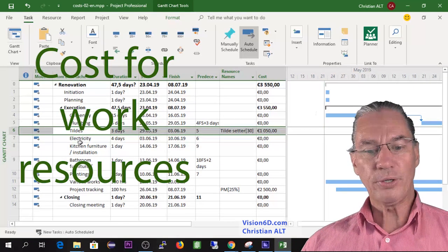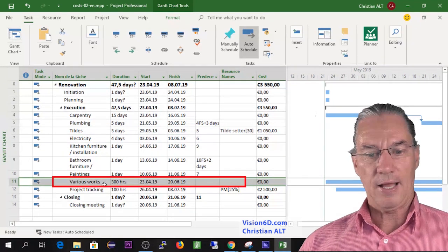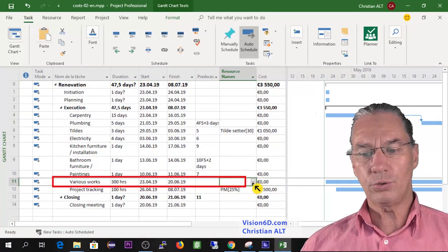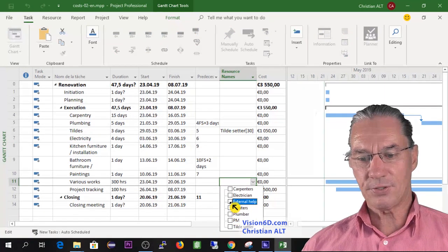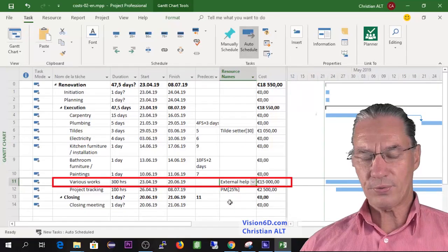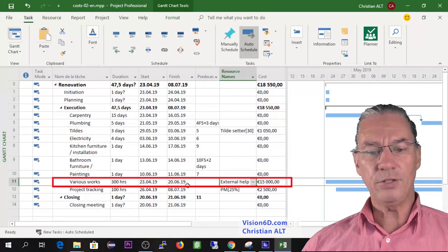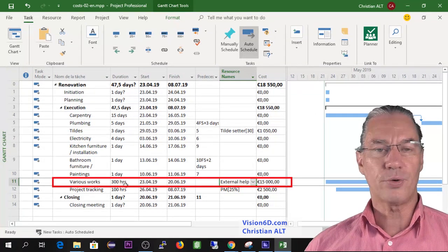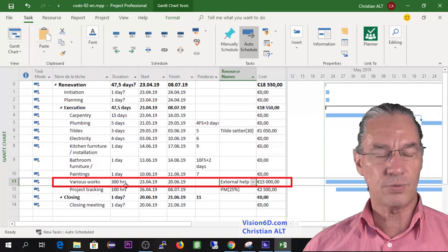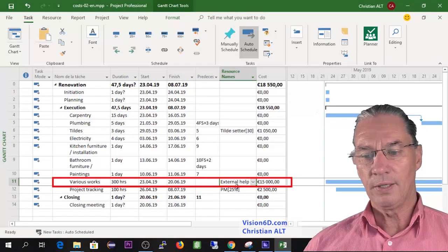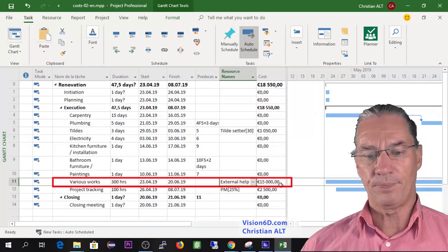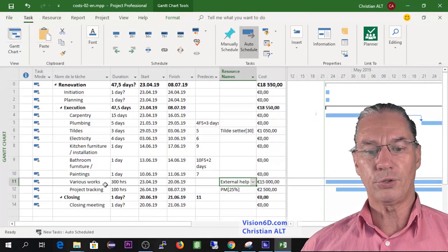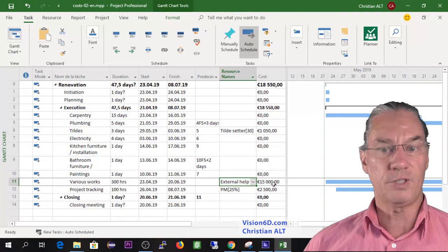I'm going now to jump here down to the various work. It's where I'm going to use the resource which is the external help. This resource is here, and you see since there is an hour rate multiplied by the 300 hours that I estimated, we quickly jump to 15,000 euros. So this is the work for the various works, the cost is 15,000.